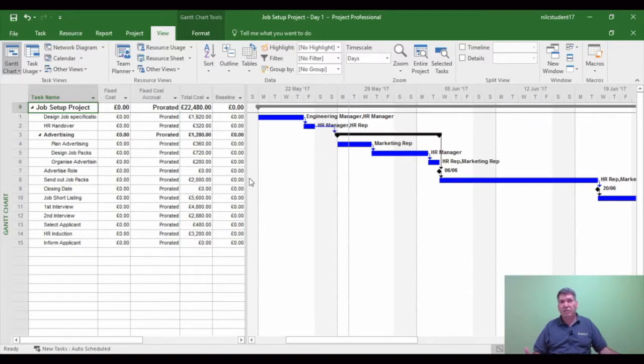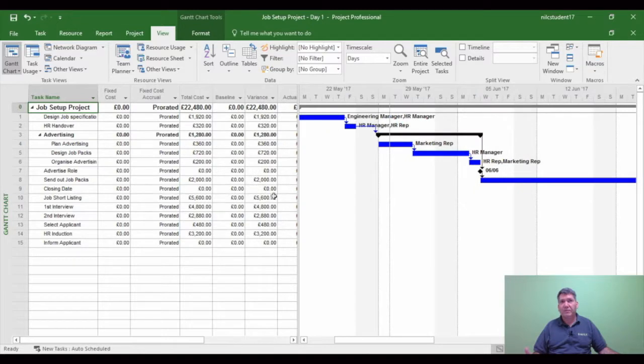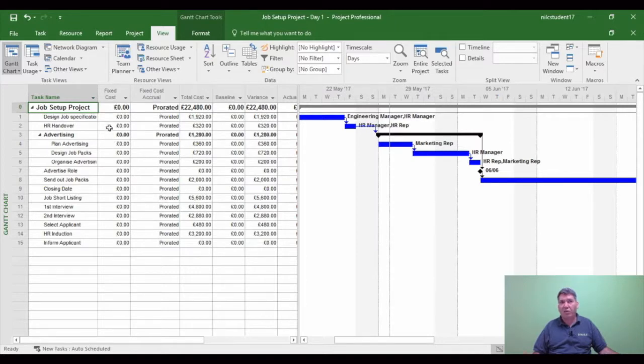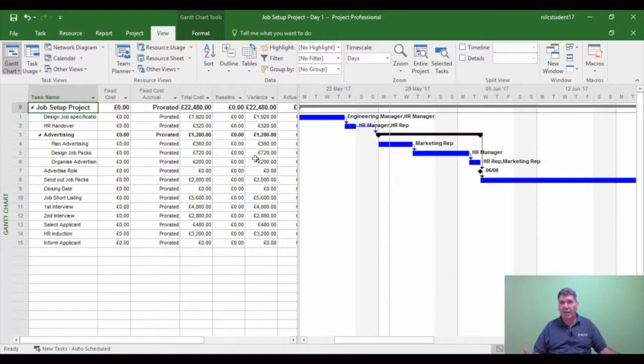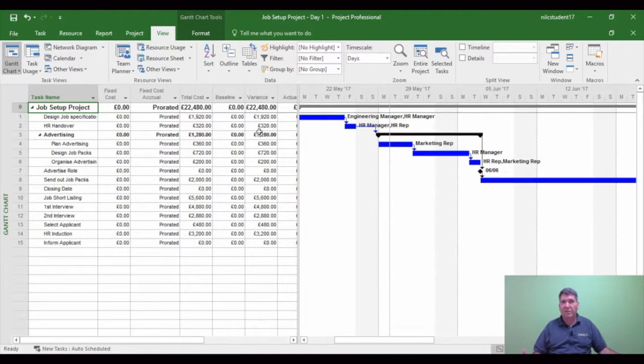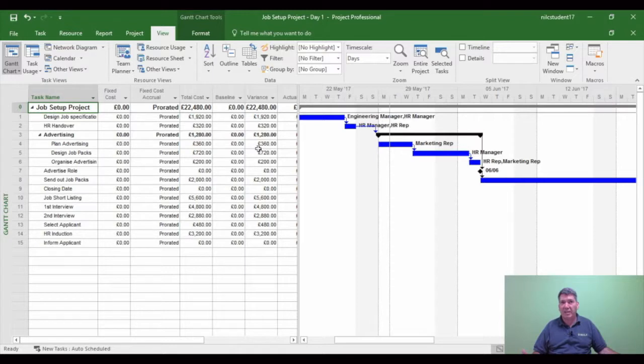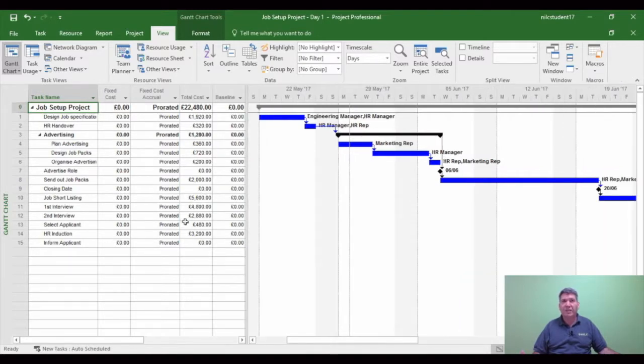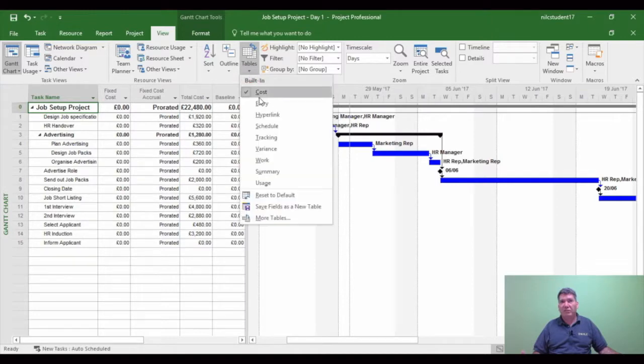Now if I just drag the cost table out a little bit, you'll see at present there is a variance. Now there shouldn't be a variance until a baseline has been set, but the variance that's showing now is just for the variance from the start of the project. So when people started inputting information, it gives a variance from that very time. So it tells you the extra money from the start of the typing of the project. So this will disappear very shortly when we set a baseline in the cost table. So I'm just going to pull that column a little bit across just to hide it again. So I'm going to change back to our default table, which is the entry table.